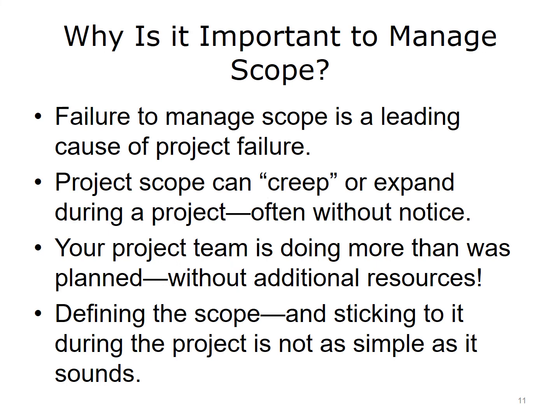Know that you can be a team player, dedicated to the success of the project, and also keep a firm hand on your scope boundaries. Educate customers as needed about the direct impacts of scope creep on schedule, budget, and deliverables, and consider changes only through a well-defined and managed process. This process prioritizes necessary changes and presents their ramifications to upper management with your recommendations for approval. You are responsible for updating all parties about the approved changes and their impact on the project.